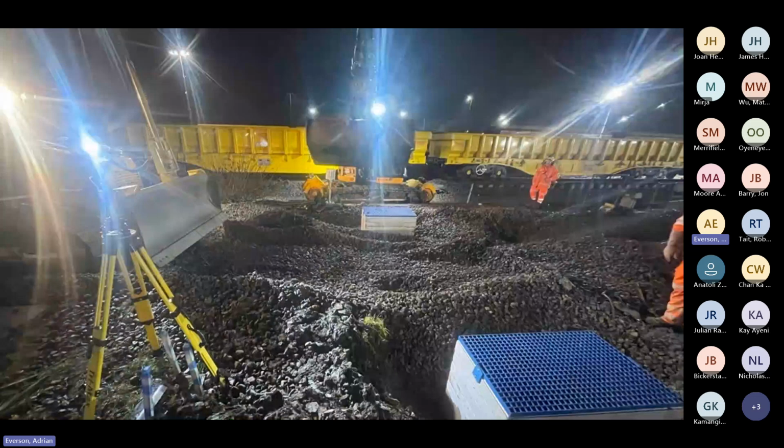We're very lucky with the blockade. We were able to, I presume, Dan, you probably up now, so a lot of track stuff went away. We let the drainage boys and girls come in and do the drainage works. We had allocated time where we had excavated and scrapped out all the adjacent tracks. They just have a free rein to do whatever they need to do. Yeah, excellent. And that's what you need every time to really get drainage work put in properly. You need that allocation of time to do the drainage work when everyone else is away, and you generally tend to always get it done.